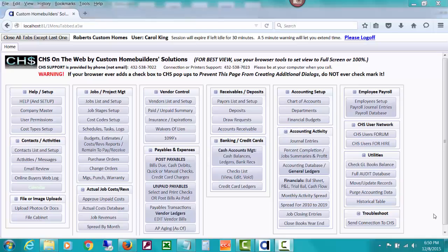This video is going to be a continuation in a series of videos about variance POs. We previously talked about creating a variance PO from scratch, or creating a variance PO from an actual cost overage that we had posted. In this case, we're going to create a variance PO, but we're also going to back charge somebody for this variance so that our estimated cost of completion is not actually over budget.